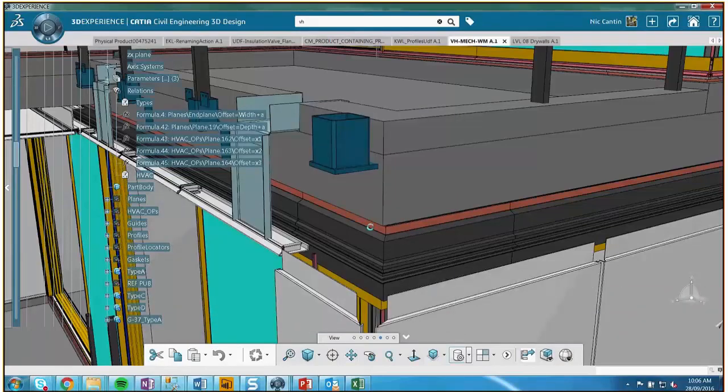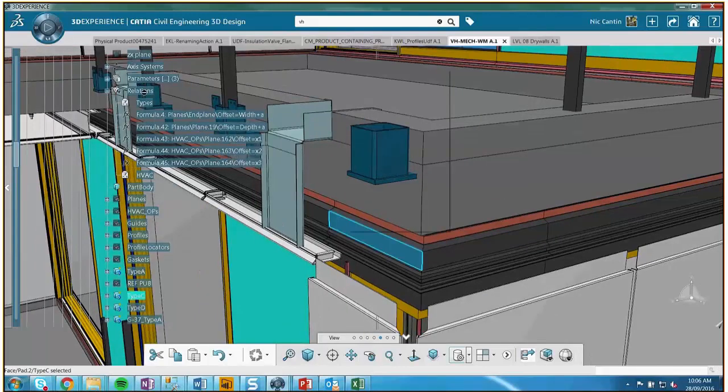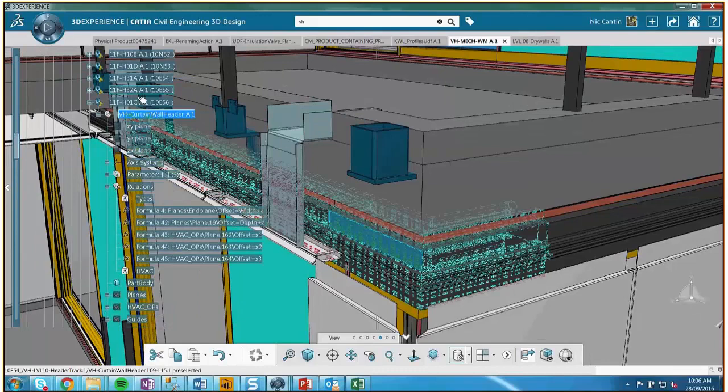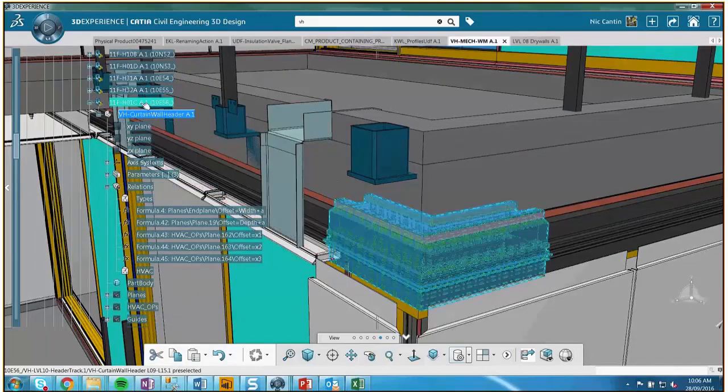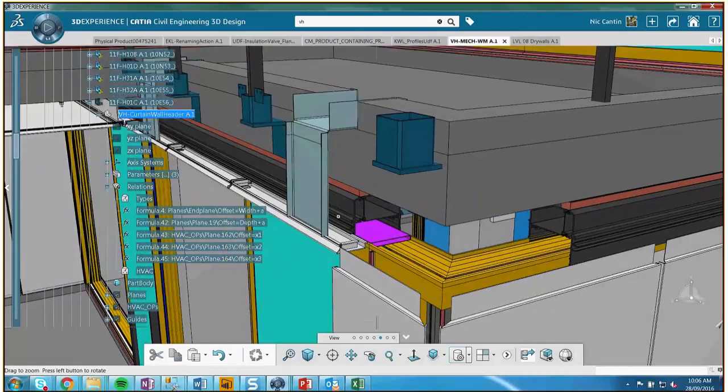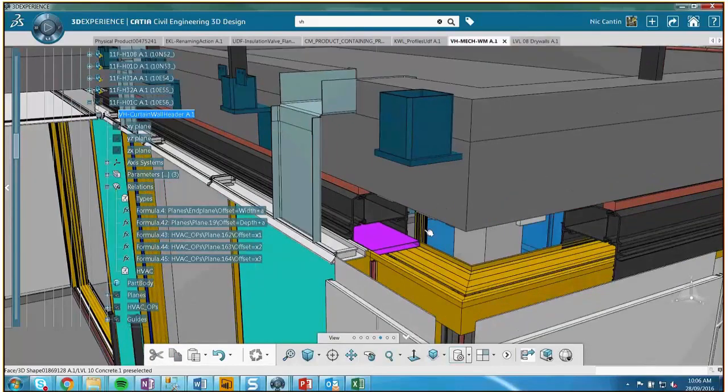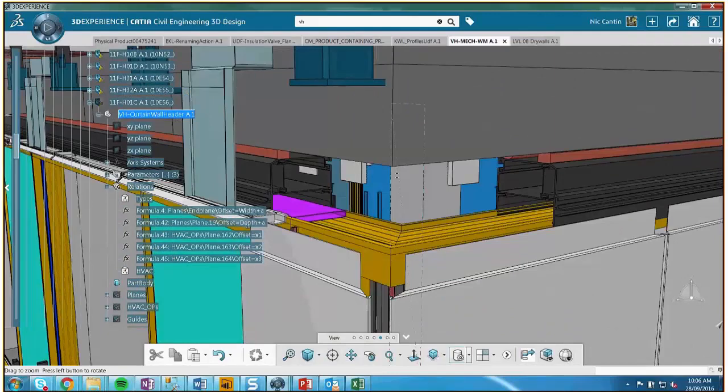Any other questions? Another thing is this is actually production, and that's one thing for the whole BIM world and VDC: coordinating a design model is a good first step, but you don't have all the information. You don't have shop drawings. The actual size of ducts can change post 100% CDs. So to be clear, every embed plan is coming from this model.